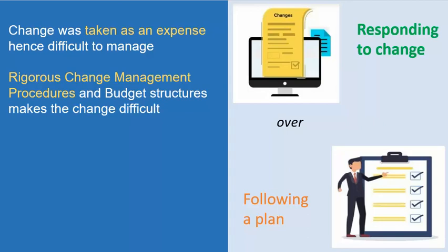If you give me a change during the sprint review, saying this was built that way but it is not sounding right, and this is your feedback, we take that change positively, work on it in the next sprint, and bring it back to you in the next sprint review. You are happy that whatever you thought earlier did not work, you suggested a change to the team, and within a 2 to 4 week sprint they have brought the change back and are showing you the working software. That makes your customer happy.